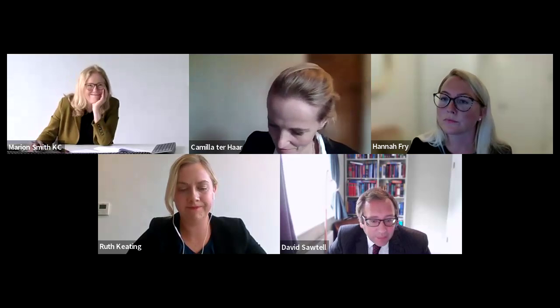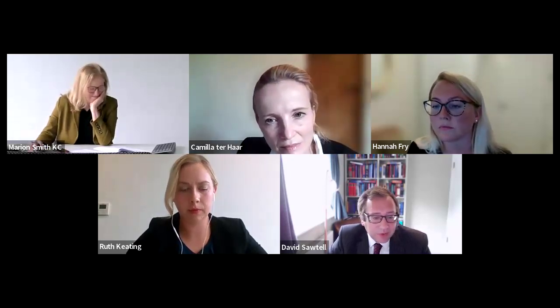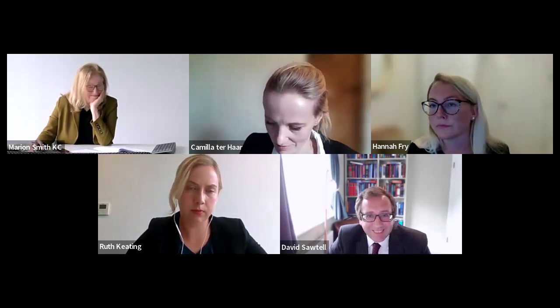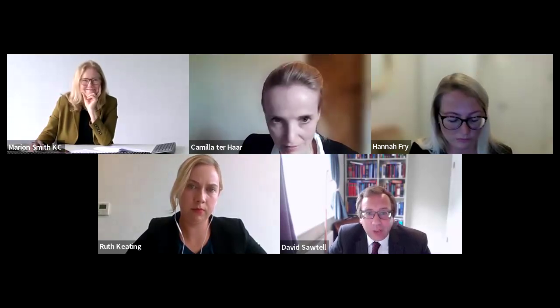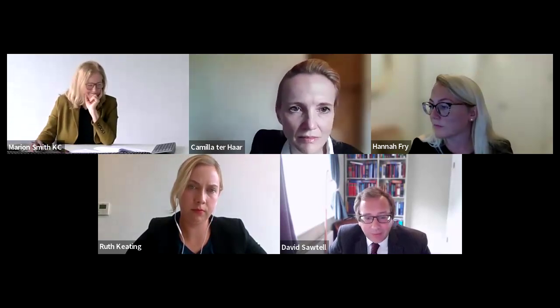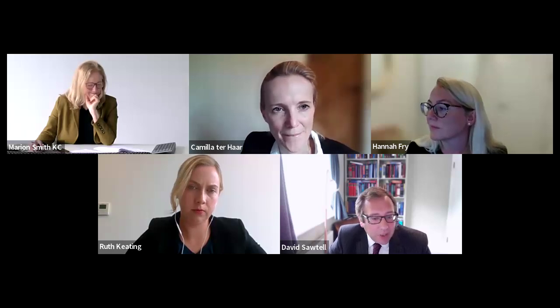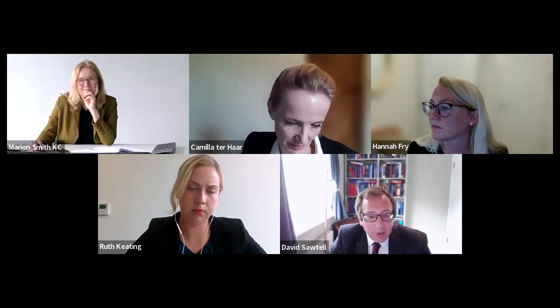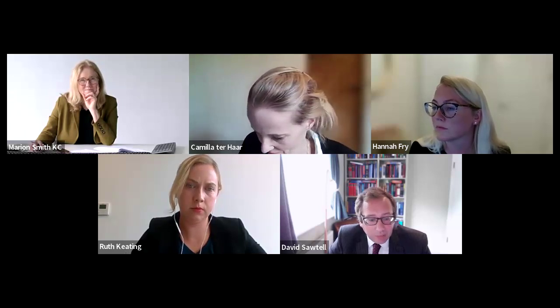The time frame within which the employer must notify the contractor of its decision on delay claim has been reduced from 12 down to 8 weeks. 8 weeks to make a decision on when you should have fully evidenced your claim. That's still an enormous period, so I can see that being amended. And so a period will run from the later of either initial notification, particulars for delay claim, or any response to request for further information requested by the employer.